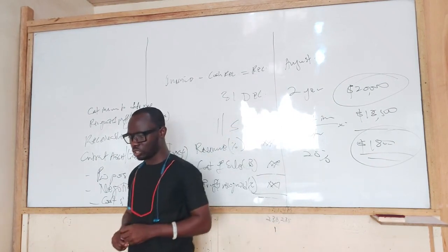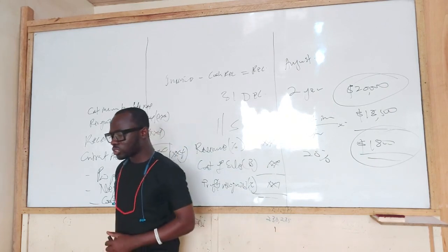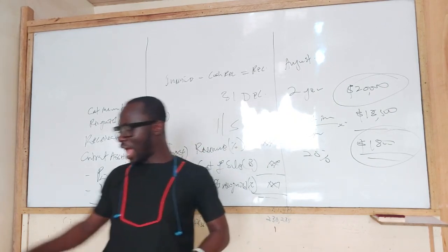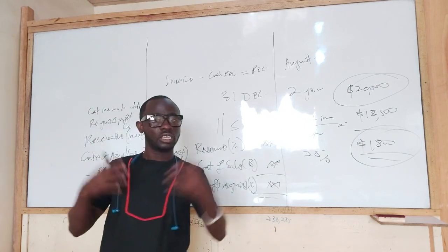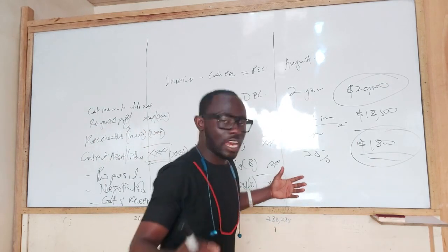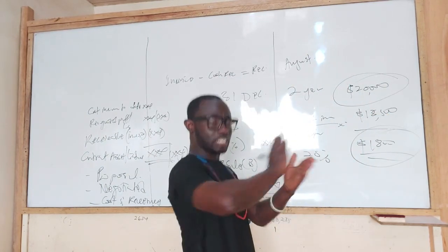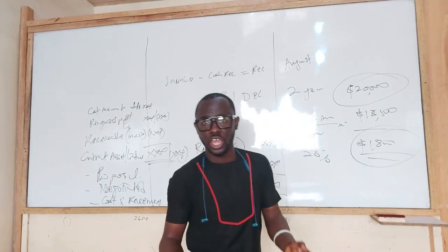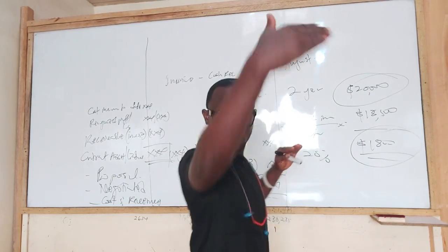A single contract. Two, the contracts are so closely interrelated that they are in effect part of a single project with an overall margin, if any. Like the illustration I gave you earlier, we are constructing a road, and the road is certainly going to be passing through a marshy area. And so if we're passing through a marshy area, then there has to be a bridge somewhere.